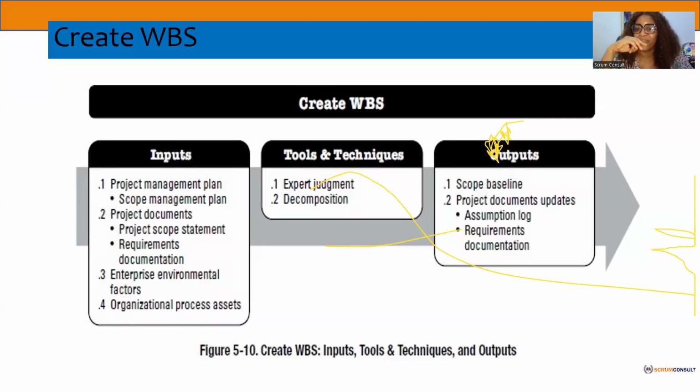So when you have a need for change and you assess the impact and come up with solutions, you can openly go. Even without a solution, you can just go and say, this is what we have, and the person is not shocked: okay, we are open, let's deal with it. But there are some stakeholders that we said are risk averse. They don't want to take risk. As such, you don't even go to them without a solution.